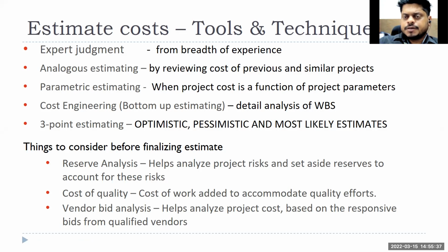Analogous estimating, if you have the database, right? Even if you're a small company, a startup company, but you have been working in that industry for the last 3 to 5 years, you have been implementing, let's say, 50 or hundreds of projects in that area, right? So at least you have some database. You know exactly for a similar kind of project how much cost you have incurred, right?